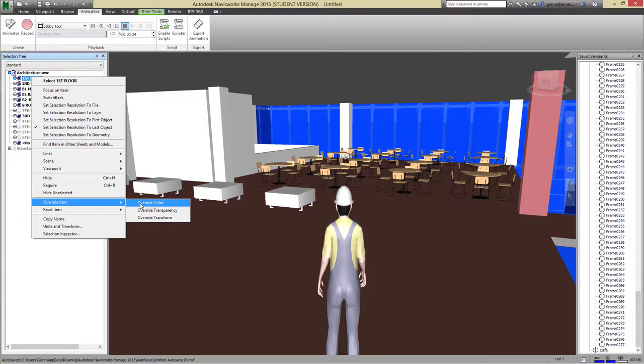The file set means I have a live link to the newest version of the NWC, or the current version, not an NWD. So for example, if I had a shared drive with this file called session one, the one that you gave us, and I changed the model and saved it in that same shared drive, the same file that was appended to this model, then it would update automatically? As long as it has the same name. Yes, because every time you open a Navisworks file set, it goes out and grabs the current version of the .nwc.